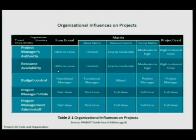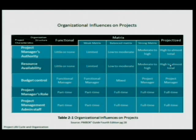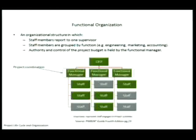Looking at resource availability, in the functional organization, the project manager has hardly any control over resources. But at the other end of the spectrum, in the projectized organization, the project manager has high to almost total control of resource availability.